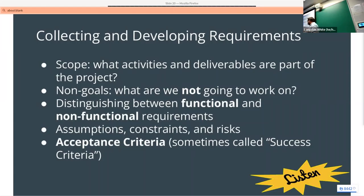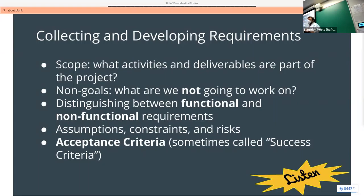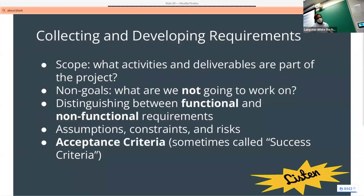Acceptance criteria — also called success criteria — is in the same vein as 'definition of done.' It means: you have completed this user story if it does these specific things. It's not 'passes all tests'; it's something like 'I am able to pay for stuff by check.' Acceptance criteria are optionally added to a user story — you'll have the user story, maybe a longer description, maybe links to examples, and then a list of acceptance criteria: 'we consider this complete if these things are true.' The industry is settling on 'acceptance criteria' as the preferred term, but your mileage may vary.